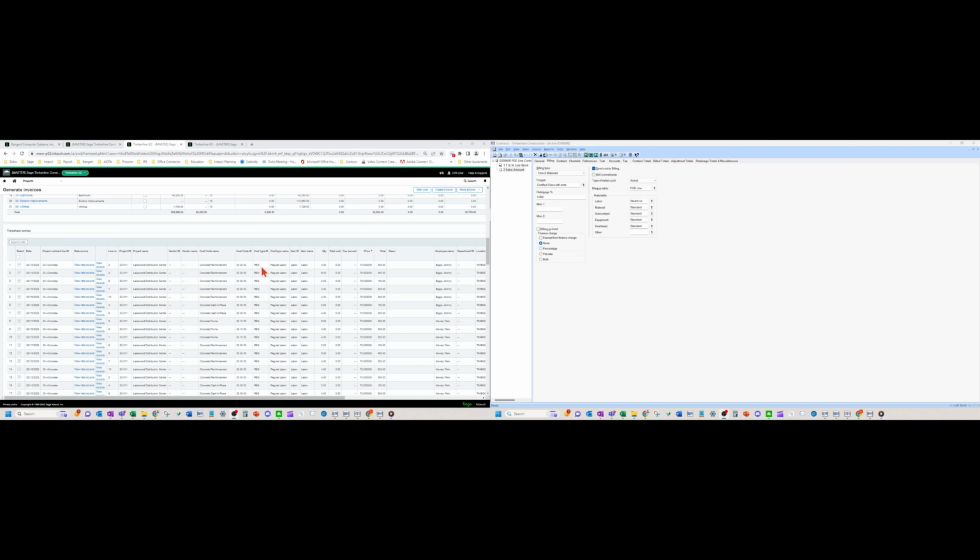Maybe it's keyed off of regular labor. Maybe it's keyed off a specific person. So all of those different really cool things you can do with rate tables, it assigns the $75 labor rate to that line based on the different criteria I've given the rate table on the job, okay? Or on that line item for the project contract on the job, okay? So it's very granular, very flexible, but very easy to understand.